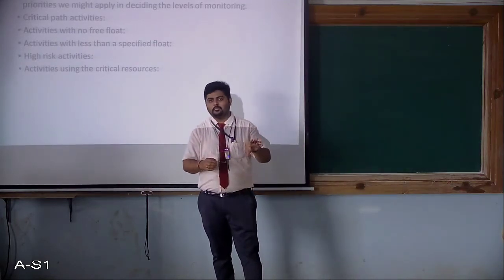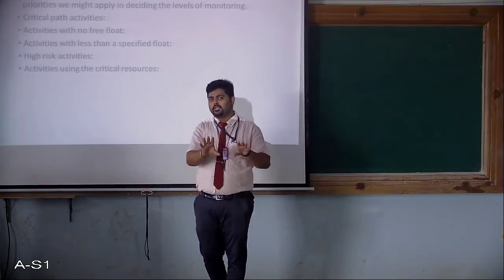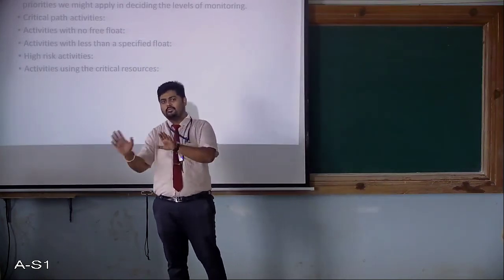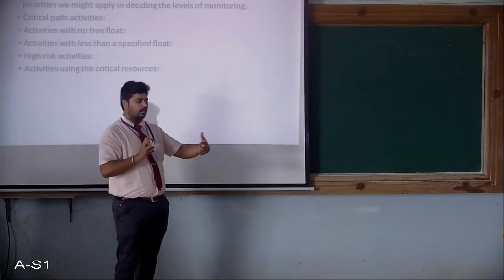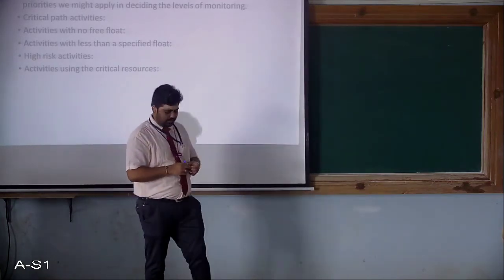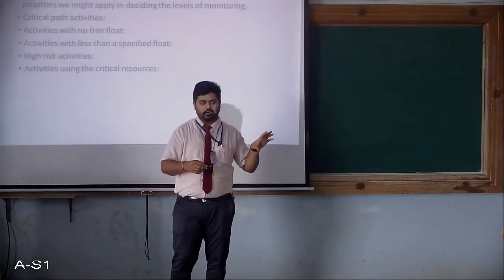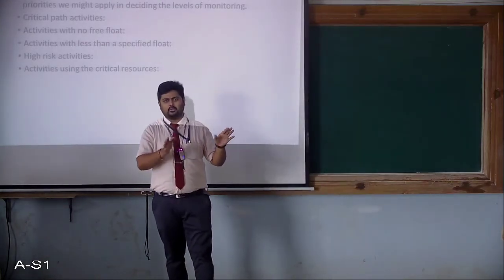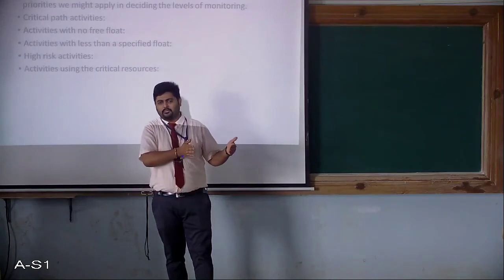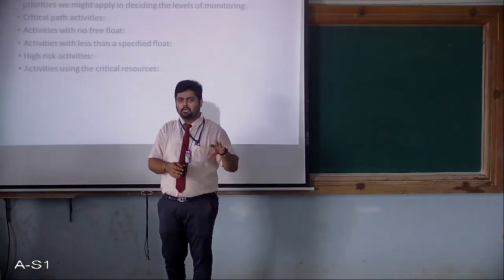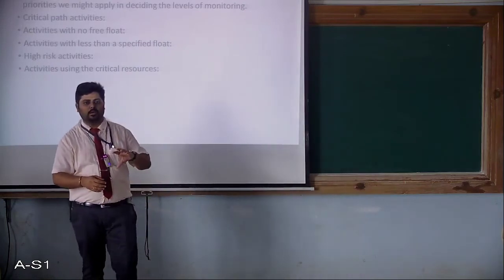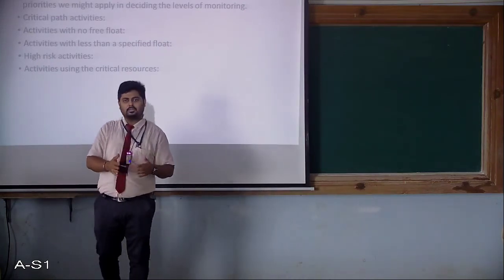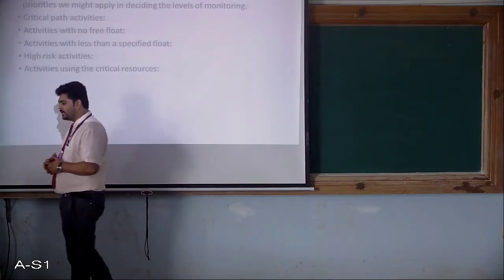First will be your requirement analysis, then the designing part, then coding, then testing, then you deliver the product. For these different segments, requirement analysis may not take 2 months. If you did it properly, it may take 15 to 20 days. That is how you need to analyze which will take the maximum time out of that particular module.